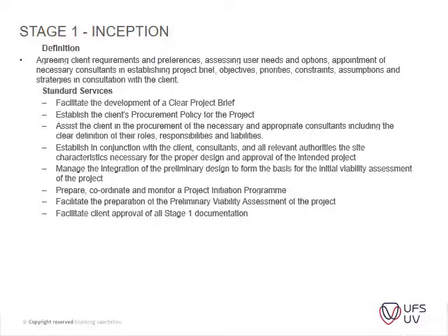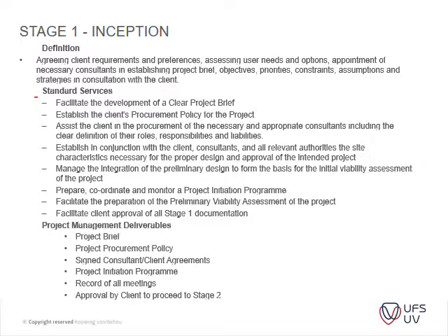So standard services that a professional provides to the client, the construction project manager. You can go through these, but the outcomes from these sessions is basically you need a project brief, project procurement policy, and signed consultant client agreements. Who are you going to appoint?